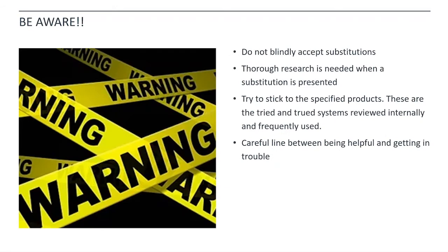So kind of the moral of this story, when we saw this, we were like, whoa, be aware. Do not blindly accept substitutions, even if the products look visually similar. And that was my whole point in showing you guys the 2 initial buildups from the same manufacturer. The initial buildup looks almost identical. You need to do thorough research on your product, especially if you are not familiar with it, and really try to stick to our tried and true systems when you can.